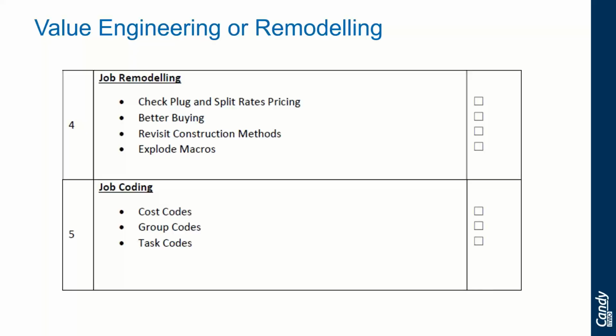So plug and split rates must also be converted to worksheet to generate the complete resource budget. And once the bid and the selling rate is in place, any plug and split rates can be converted to worksheet to view either the loss or the gain that these items may carry, as per my previous demonstration.